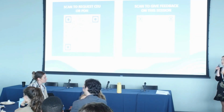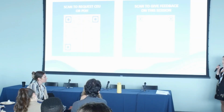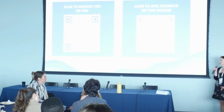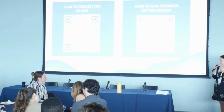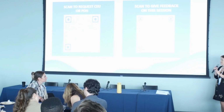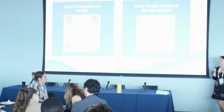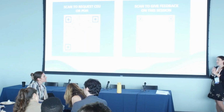I think there are certain areas of the project where the answer is yes, because here in this MJH and Wagner Park section, we're further along. We did have our contractor put in a storm plan in the event, because again, we're doing work all year round. We're very, very lucky that New York has not had a major storm in a very long time. But we did have them put a storm plan in place so that areas that may not have been completed at the time could actually have some level of protection in place.